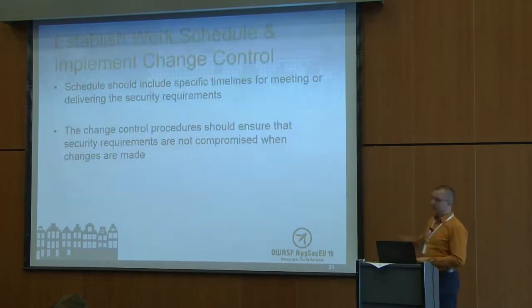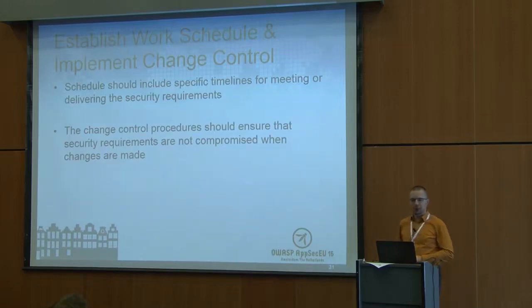As I mentioned, the schedule should include specific dates, a timeline for meeting the requirements which have been established for security. And change control would then ensure that the requirements are not compromised whenever a change is introduced into the software being developed.